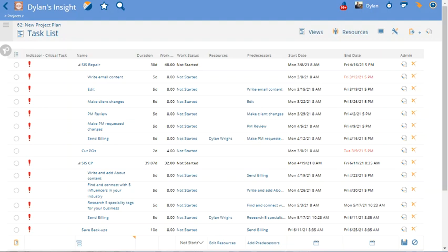This video will talk about the Critical Tasks feature in Project Insight. You may have noticed the task list indicator, Critical Tasks, and asked, what makes this task critical and maybe why is one not critical? The short answer is, a task is critical when its duration, start and end date, affect the end date of the entire project.